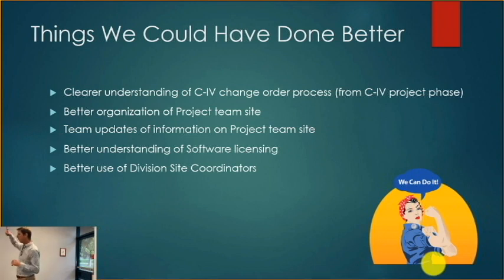We had 4 levels with this project. We had our executives at the top, we had our division coordinators that were people responsible for each of the divisions, and then we had our site coordinators, men and women at each site that helped facilitate with us, and then we had the actual field services team that was doing all the work. Initially I included the division coordinators, but what I learned was that they were there as a point of escalation in case I came across a problem site and I needed someone in a managerial position to turn to.